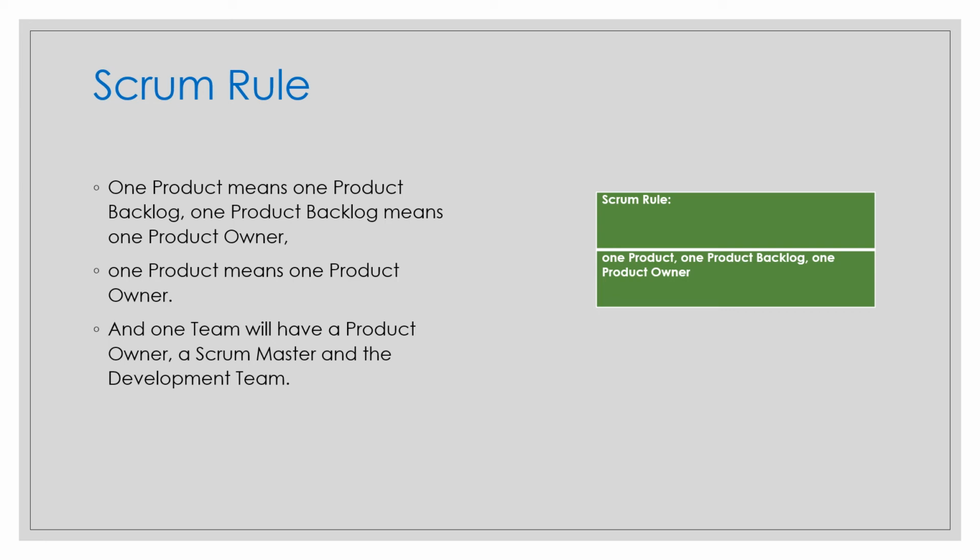If multiple teams are working, it is not necessary that all the sprints start and end at the same time. It can vary. We should track dependencies so there are not too many, and increments are the same. Everybody needs to understand that the product increment is done only when it is integrated, usable, and potentially releasable,